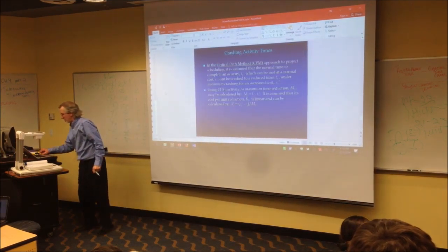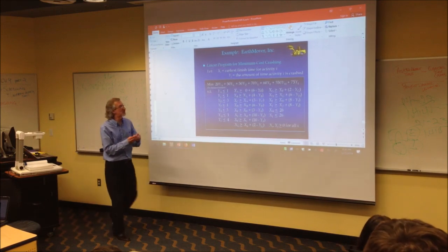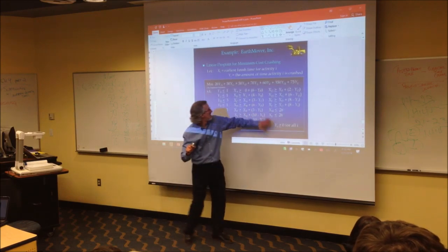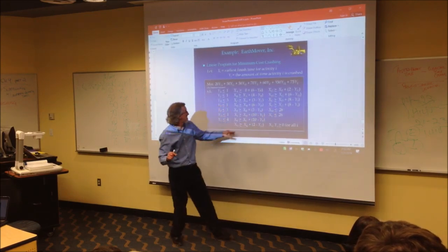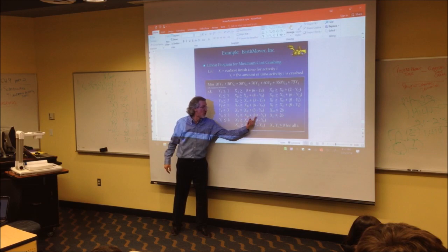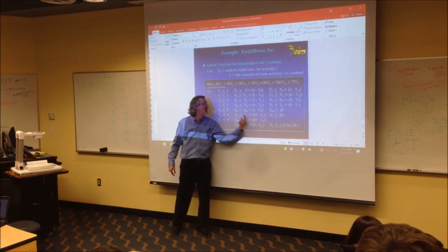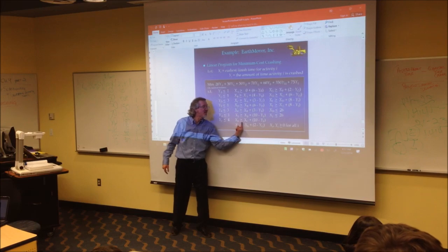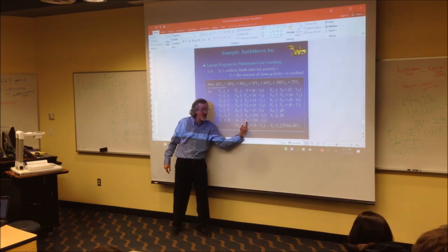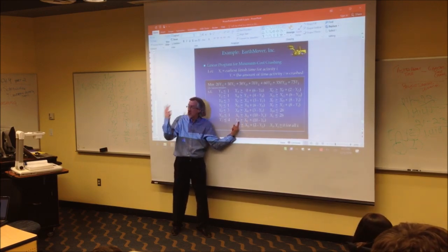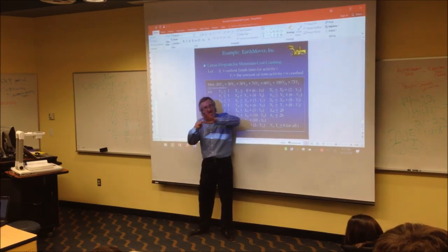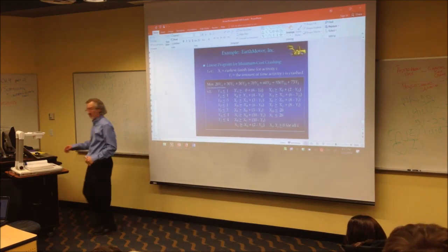Let me show you. Anytime an activity has more than one activity preceding it, you repeat the whole process up to that little change. Which one had two? H didn't have two. G did. F, thank you. X sub F greater than or equal to x sub B plus the normal time for F, 10, minus y sub F. It has another activity. There's x sub F again, and everything's exactly the same except the other activity that precedes it, which is C. So you have x sub B in one, x sub C in the other. We have two of them because there were two activities preceding F. That determines how many x constraints you have, based on how many activities preceded.